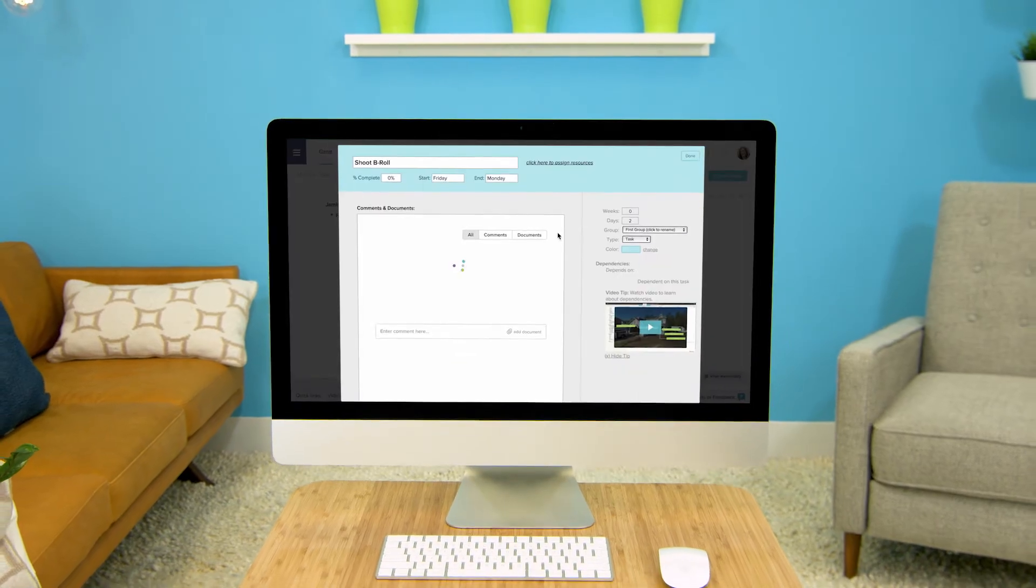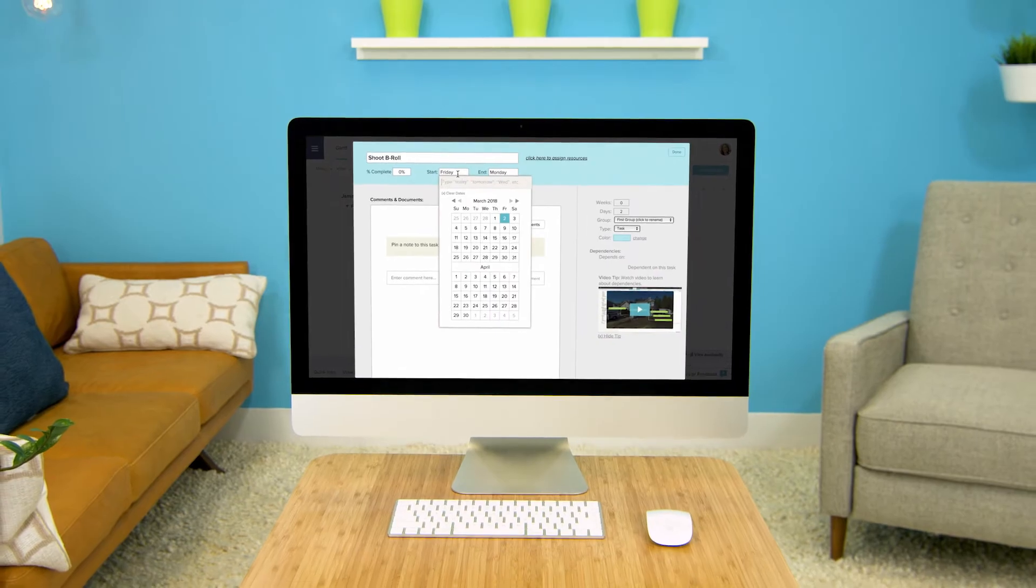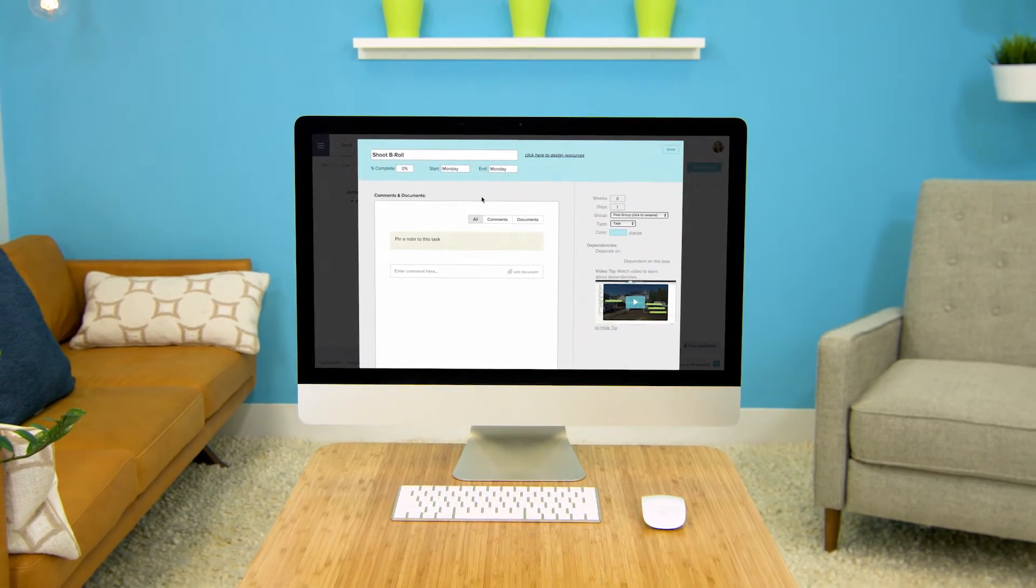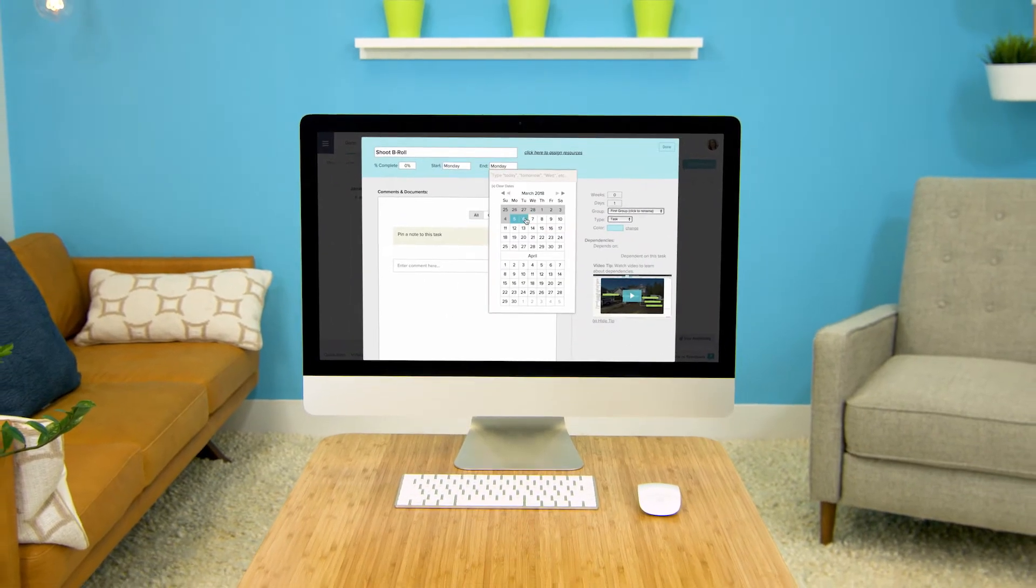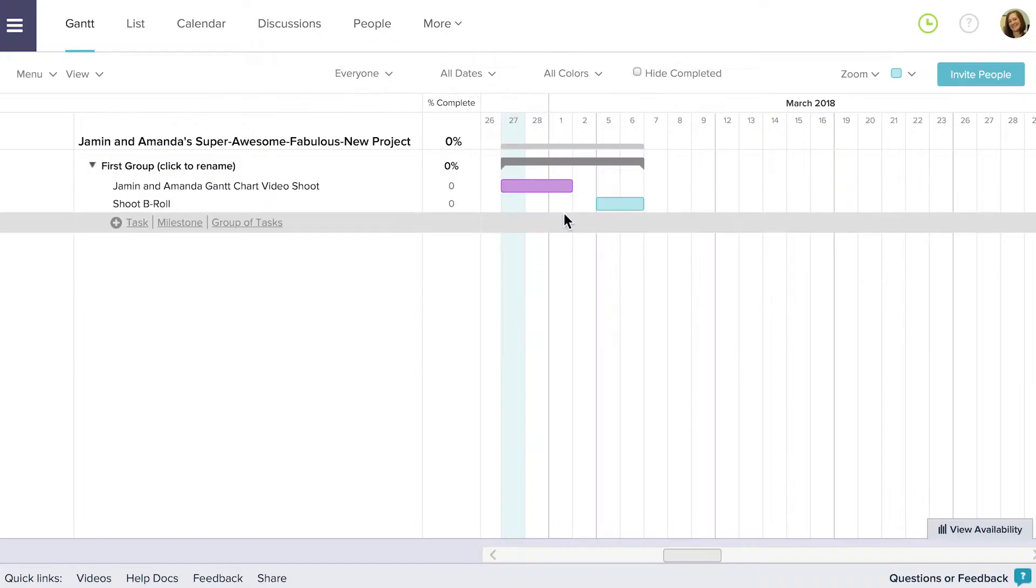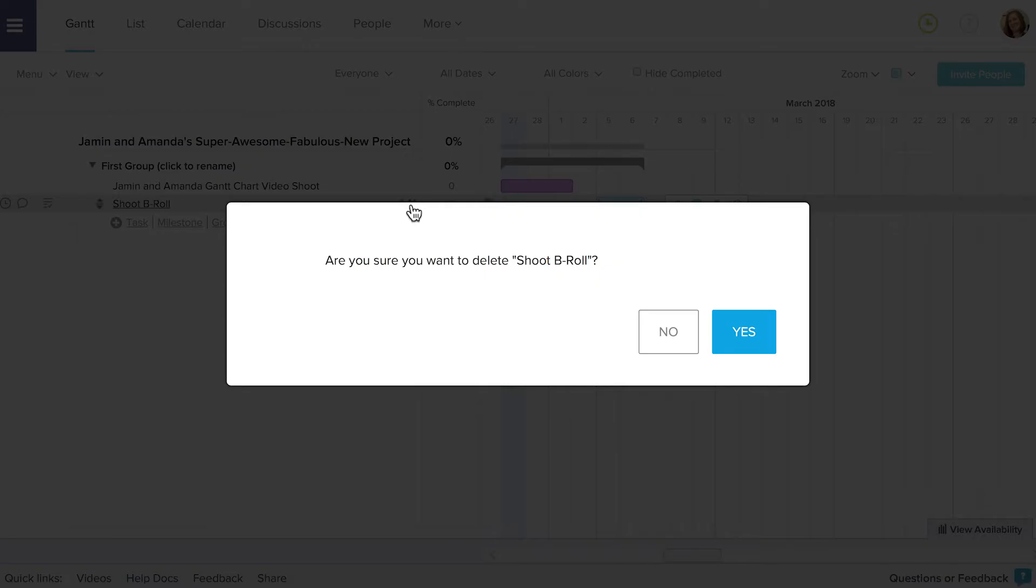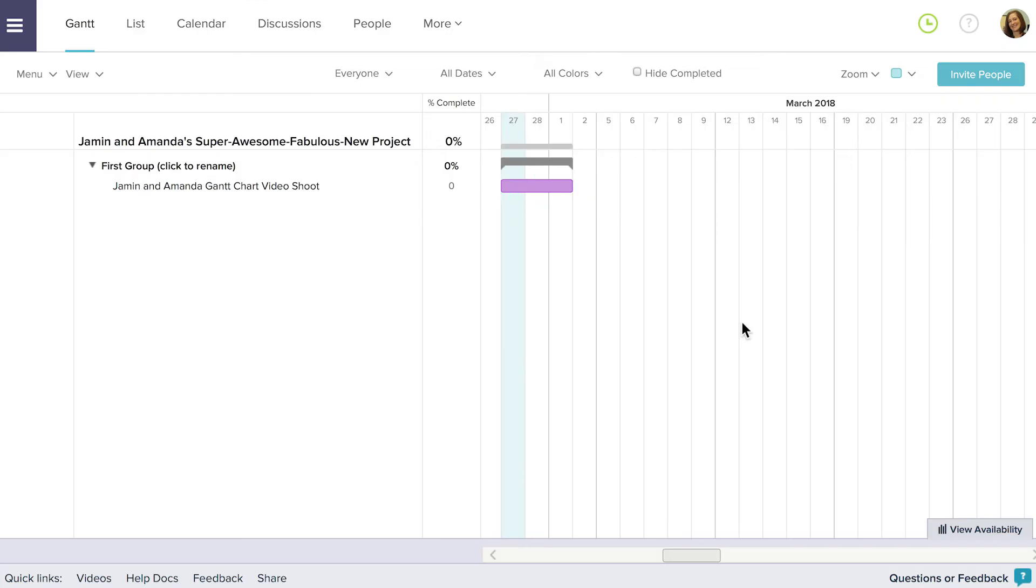You can also do this by double clicking on the task bar and adjusting the start and end dates from within the task detail window. To delete a task click on the X that appears near the task's name when you mouse over it. You'll be asked if you're sure if you want to delete the task. If you are click yes.